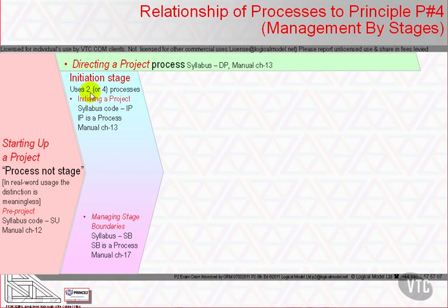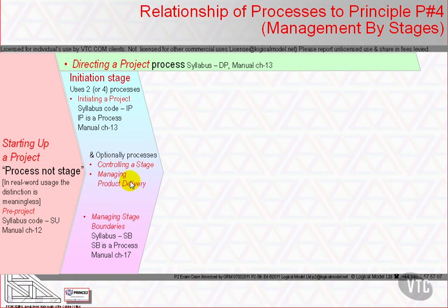The third element is the initiation stage, which uses two processes: Initiating a Project (syllabus code IP, manual chapter 13) and Managing Stage Boundaries (syllabus code SB, manual chapter 17). If the initiation stage is sufficiently complex, we may also use Controlling a Stage and Managing Product Delivery to control its internal operation — in which case the initiation stage uses four processes.